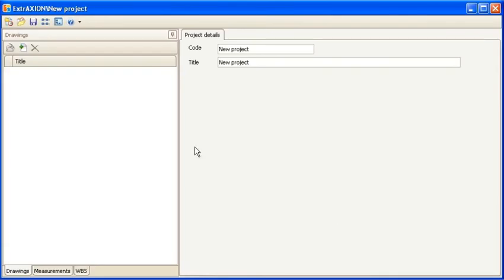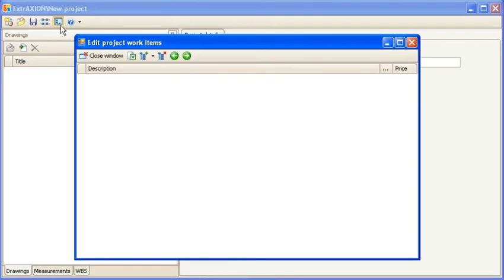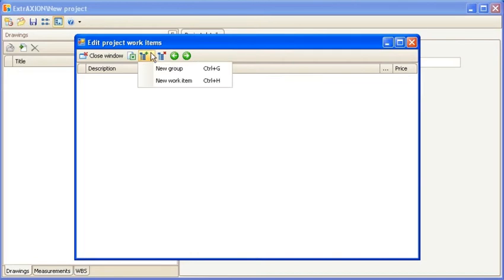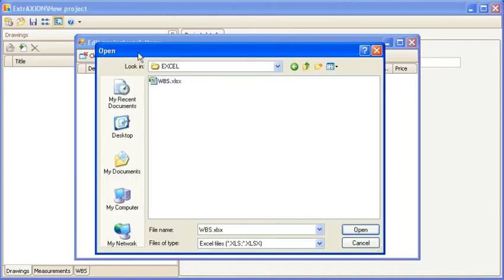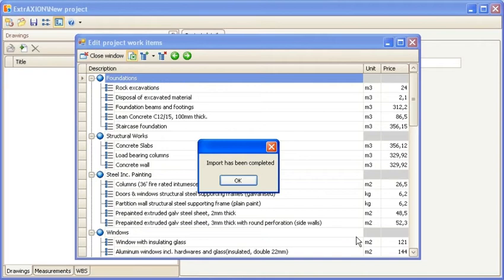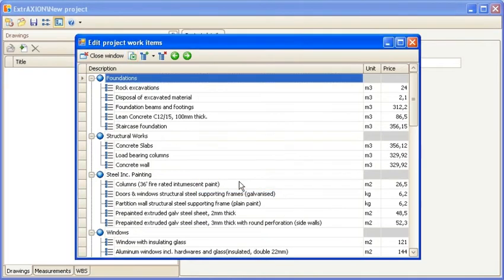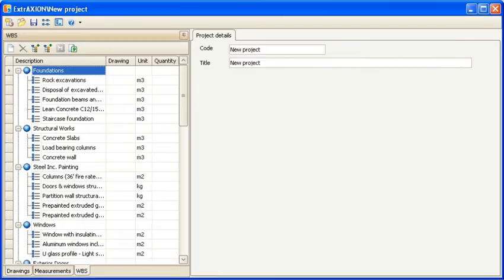You can manually insert the project's WBS using the WBS button, or you can import it directly from Microsoft Excel. Press the Close Window button, and the WBS is automatically entered into the WBS tab.